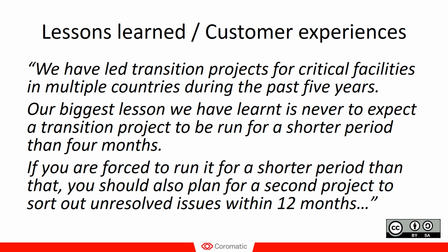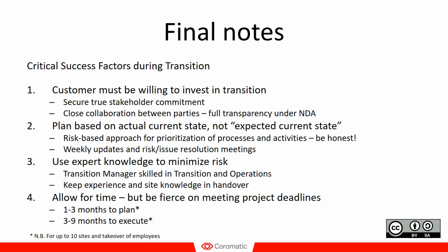And we've also collected some critical success factors during transition projects over these past few years. The first one is that the site owner or the customer must be willing to invest in transition, because this secures a true stakeholder commitment. If the customer is not able to understand the value of transition, it is a worrying sign that they may not be so engaged and committed in the actual integration of processes between the parties, because this requires a close collaboration, naturally under full transparency under a non-disclosure agreement.